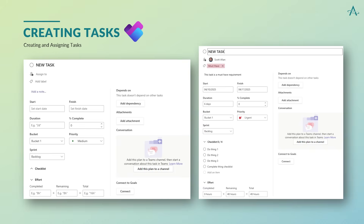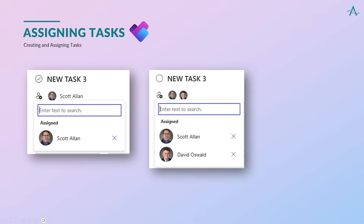Assigning a resource is as simple as selecting the Assign To icon and typing the name of the resource. If that person is in your M365 organization, the resource will populate. The other options include adding dependencies like predecessors in MS Project, adding attachments like files or even web links, and connecting to overall project goals. Multiple resources can be assigned to one task, allowing for two or more resources to be responsible for that task's completion.